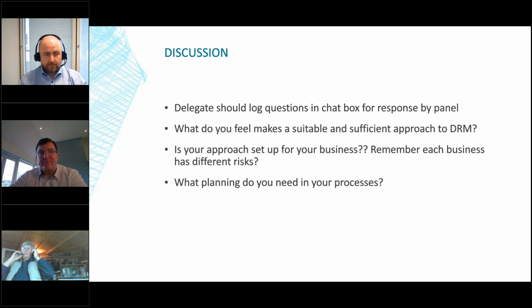I was going to say, so I'm certainly very keen on getting this early engagement, but that obviously means client appointment at early stages, or making a pre-contract service agreement to get that sort of specialist advice, because it might well have not been tendered at this stage and we're still going through a design process. So that's where things can fall down a bit, because it's great to have this early engagement, but if you haven't got the legal issues in place, then they might come in and give you perhaps inadequate information if they haven't got the job yet. So that is very much a client requirement to buy into this process.